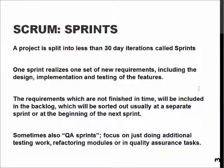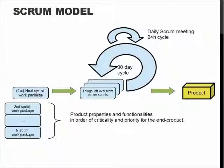Additional testing like load testing or performance testing requires a somewhat stable system to work with. We may also need to refactor modules to get rid of unnecessarily complicated code or bad code habits, or simply do quality assurance tasks to verify that the product will fulfill the quality requirements when the last sprint is done. So basically, the sprints may sometimes only keep realizing the things which are left over from earlier sprints.